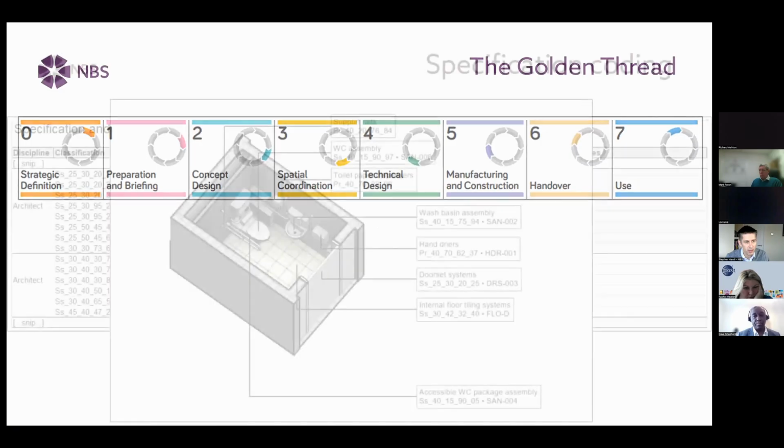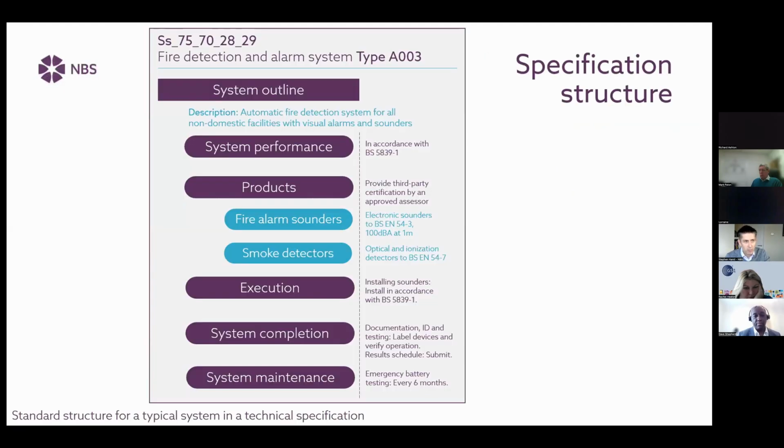If it's going to be a performance spec and you want the prescriptive spec sent backwards, there'll be submittal requirements saying submit the design to whatever standard and show evidence of all the products, lead times, etc.